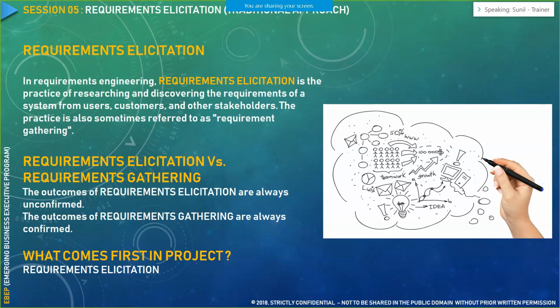Now as a business analyst, we have to not only understand their requirements, we also have to create the necessary artifacts like your business requirement document or software requirement specification, or the design artifacts like UML, UI screens, prototypes, then use cases. We have to develop all these things. In order to do that, requirement elicitation is a phase which is there for our rescue. This is the phase which takes the maximum amount of time in any project, typically 1 to 2 months